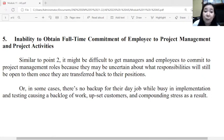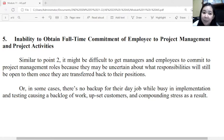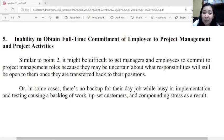The fifth risk is inability to obtain full-time commitment of employees to project management and project activities. It is difficult to get managers and employees to commit to project roles because they may be uncertain about what responsibilities remain open for them once transferred. In some cases, there is no backup for their job while they are busy implementing and testing, leading to a backlog of work, upset customers, and compounding stress.